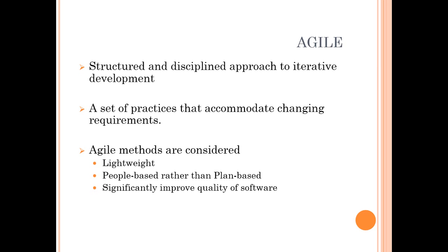So it's pretty lightweight, where we can have a very good focus and team members can understand the set of requirements very well. In agile, the main focus is on individuals and the communication they carry out, because in agile team size is not like 40 folks or like 20 developers, 15 testers, 2 documentation team members, 2 architects. It's not like that. In agile we have very small teams. Like the standard convention for agile is 7 team members plus minus 2.